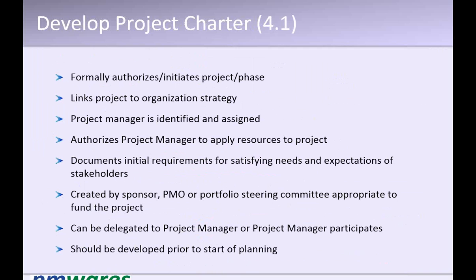And that business case must come in the project charter. It is one of the primary things to be mentioned in the project charter: project objective and business case. These are the two things. Project objective is what is to be achieved. Business case means why we are doing this project. What is the problem we are solving?